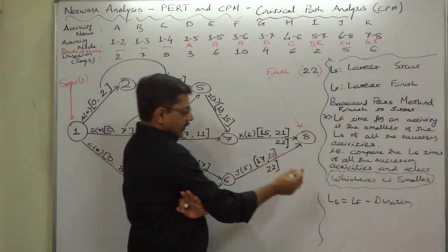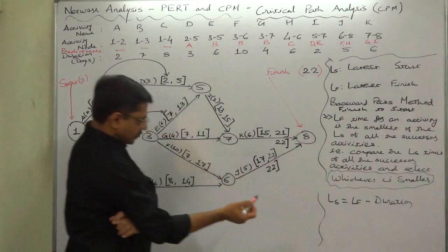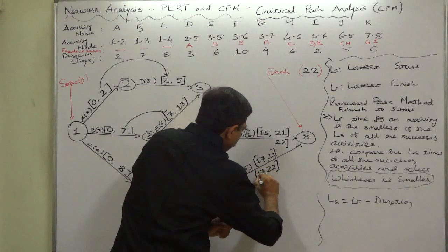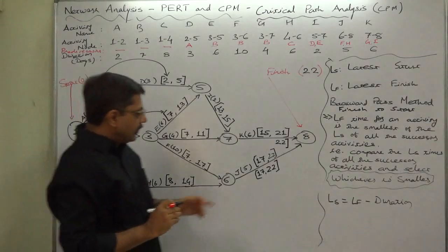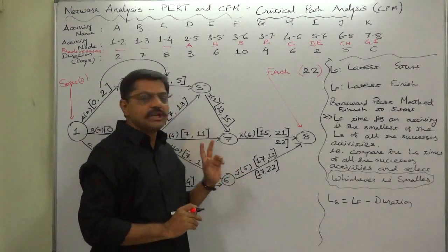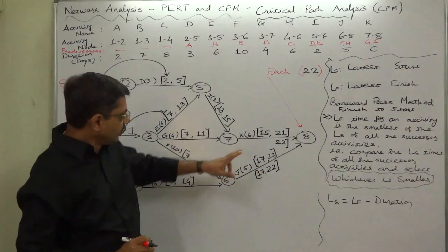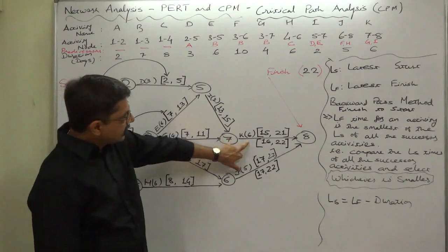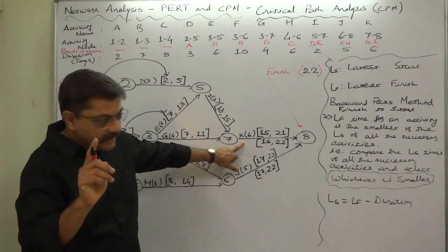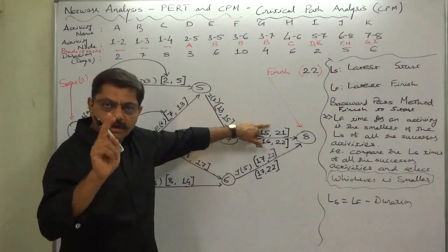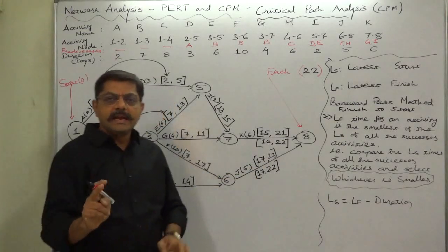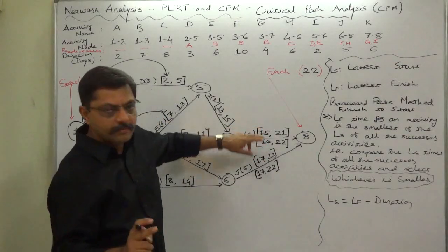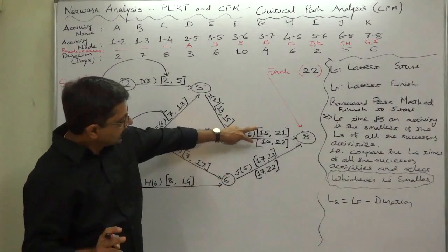Latest start time equals latest finish time minus duration. For activity J it will be 22 minus 5 = 17. By the 17th day we must start J - this is the interpretation. For activity K it will be 22 minus 6 = 16. This is the latest allowable start time for K, meaning instead of starting K on the 15th day, even if we start K on the 16th day we can complete the project in 22 days. We have a flexibility of one day.